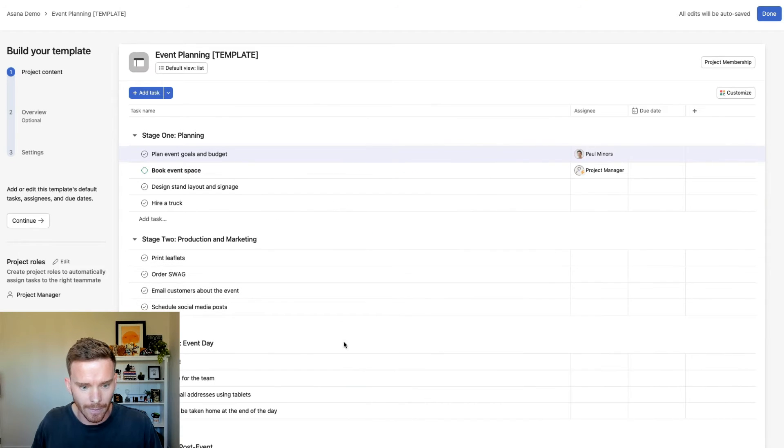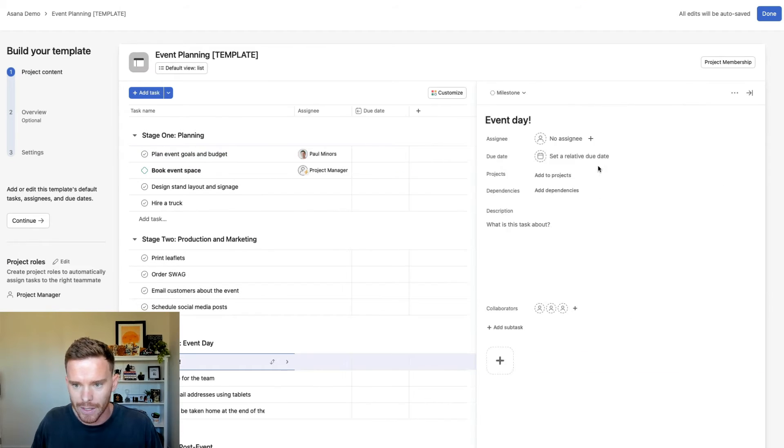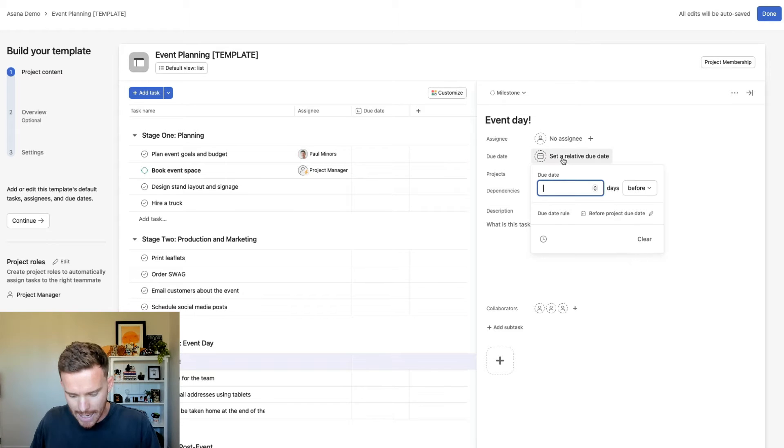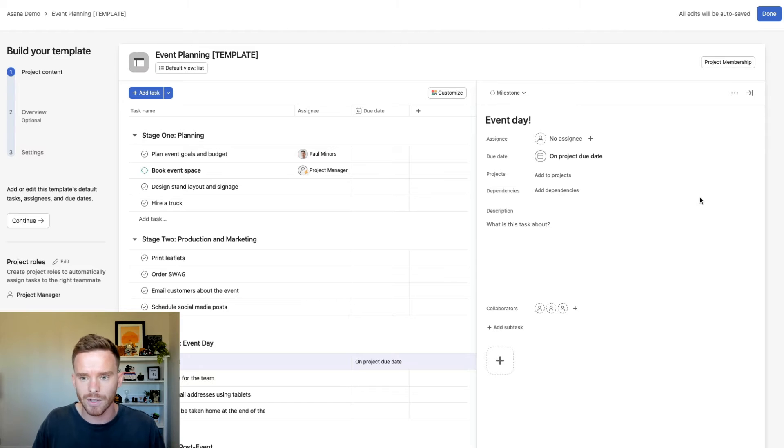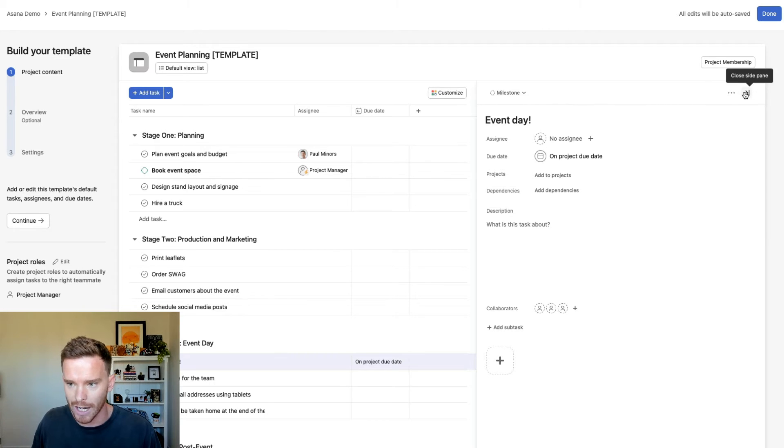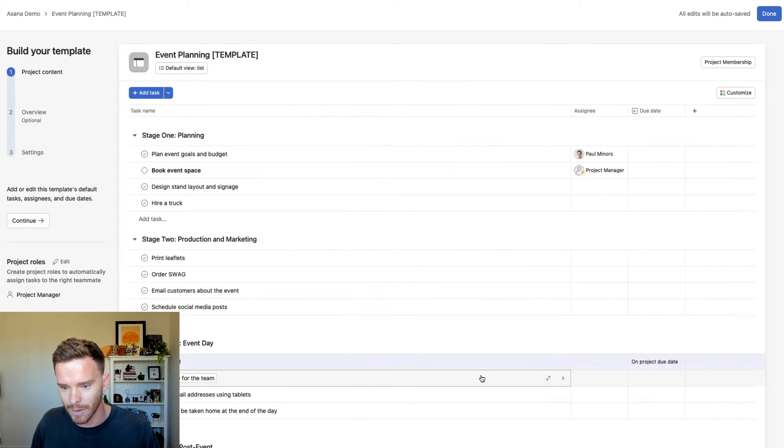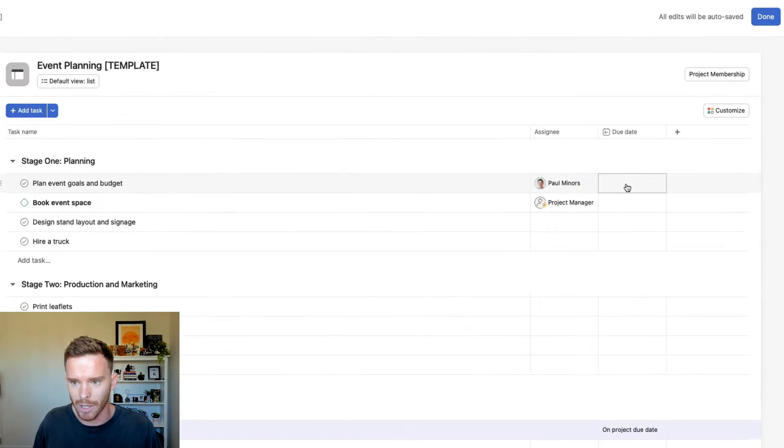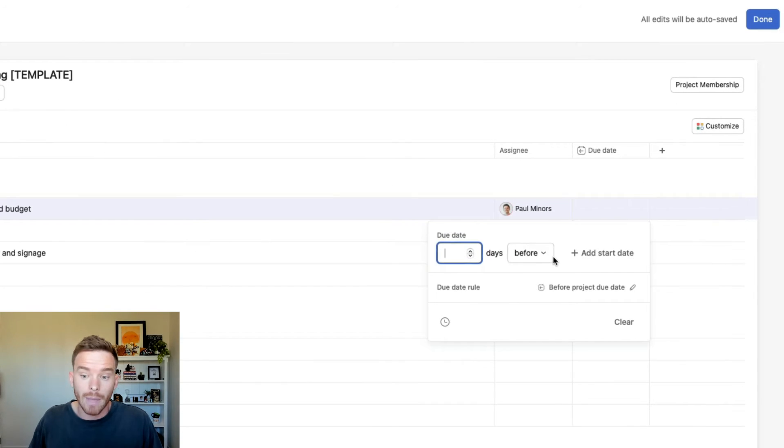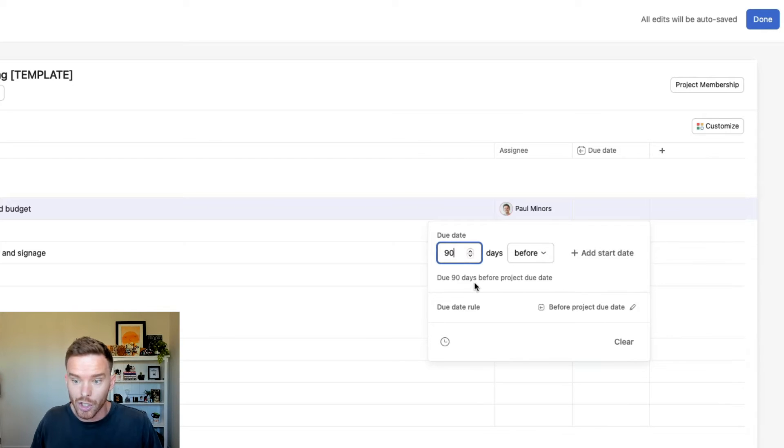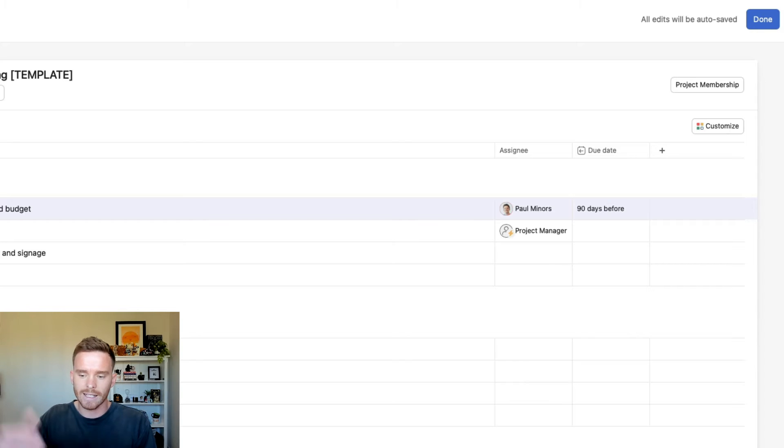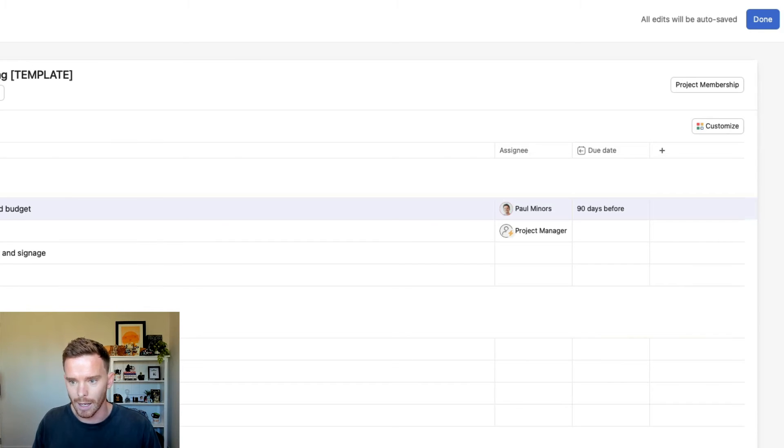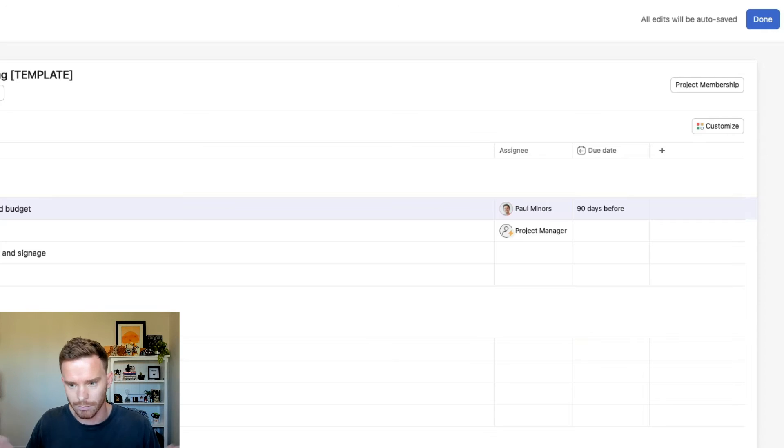So if my event day here, this is going to be day zero. That's essentially the due date of my project. We're working backwards from the event day, so that is our project due date. And so then a task like plan the event goals and budget, maybe I want to do this 90 days before the due date of the project. So now, if this is due, let's say I say my project is in three months from now, this plan event goals is going to be due 90 days before, so probably today.